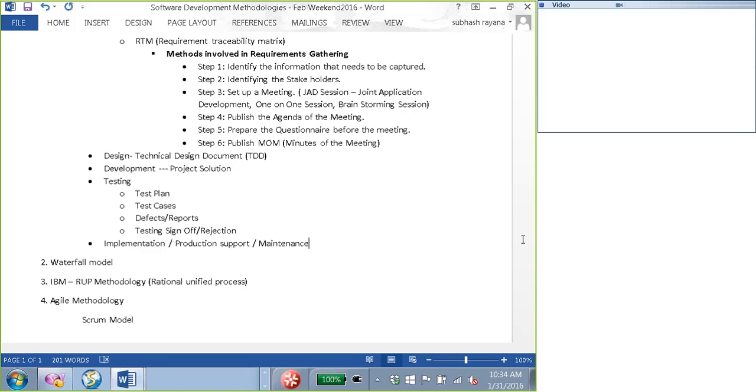See, normally during the project planning, the testing phase is allocated time, right? Now, the testing phase is not only for the testing team to test and report defects. That time also includes the time required for the developers to fix and resolve the issue and promote the code again with the fixes. So all this is already estimated and the testing timelines are planned accordingly.